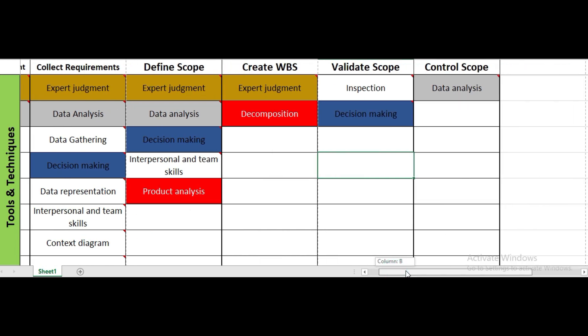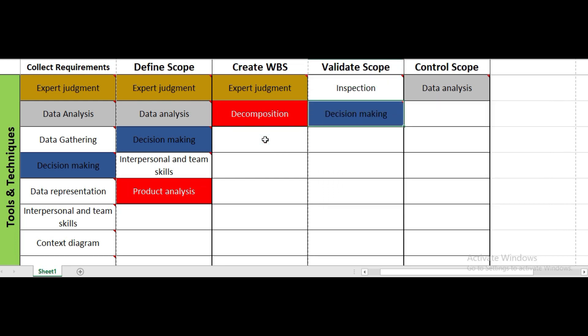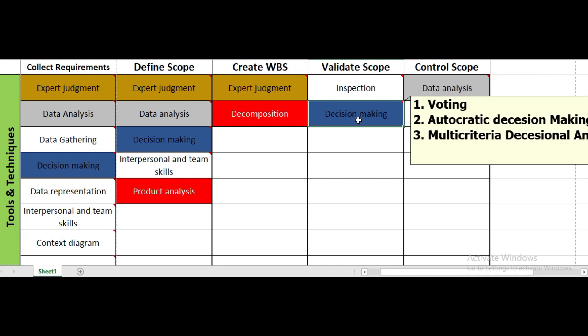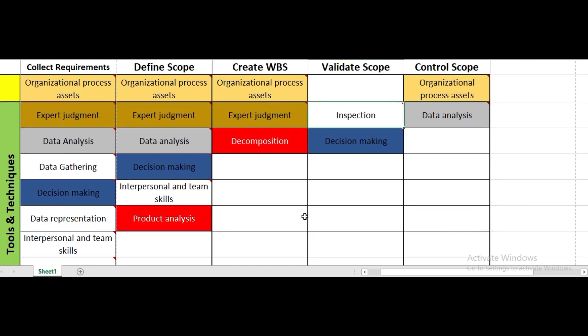For create WBS, the tools and techniques are expert judgment and decomposition. Decomposition involves breaking down project work into smaller, manageable components called work packages that are easily measurable with realistic estimates of cost and schedule. For validate scope, the tools are inspection — where we inspect deliverables from the execution process — and decision-making. For control scope, the only tool and technique is data analysis.